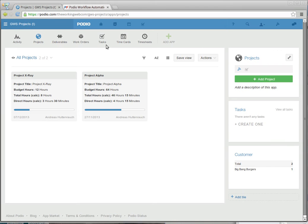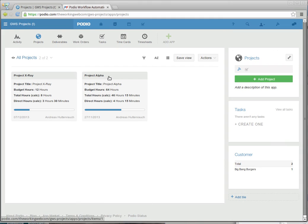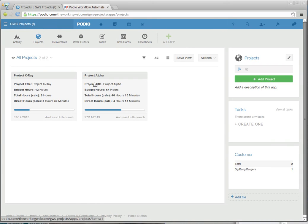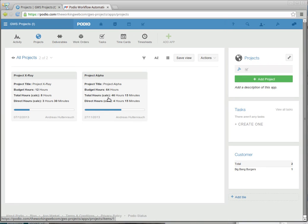Employees are then allowed to, through the timesheets app, bill time either to a task, to a work order, to a deliverable, or to a project. And all of the numbers add up. So the way we have to do this is to have direct hours on all of these, which means all the time that's been directly assigned to the project, and then indirect hours, which come from deliverables or from tasks.